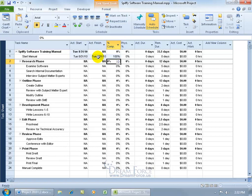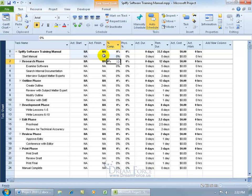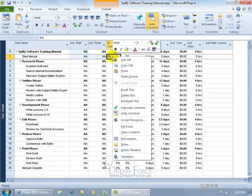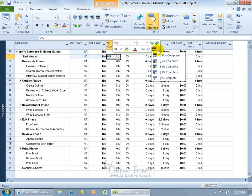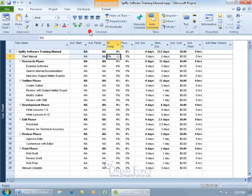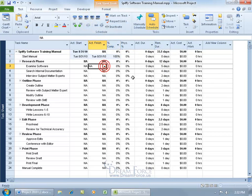So remember, these cells used to be NA for not applicable, and it says, okay, since this task has been completed, that means that we're going off the plan, that the actuals will be August 31st. You can do it that way, or you can actually right click anywhere on that task row, and when you right click, it brings up the mini formatting toolbar, you can click on the percent complete. Of course you only get quarter percents instead of being particular, like 33% in the percent column here, or you can come up here on the task tab to the schedule group, and there you go, 50% or 100%.